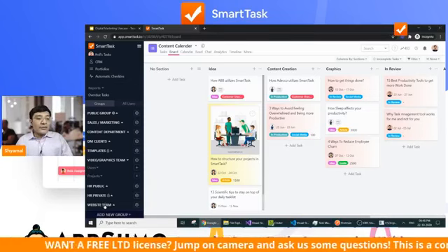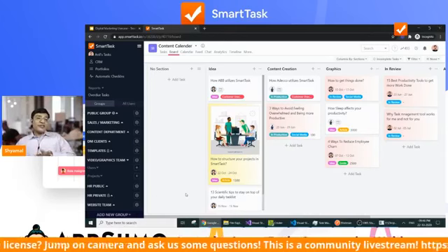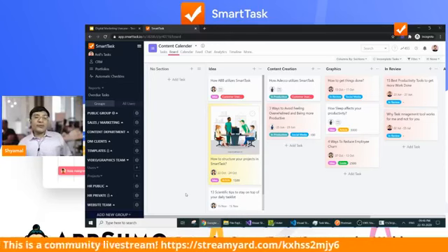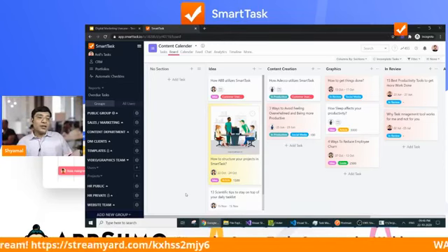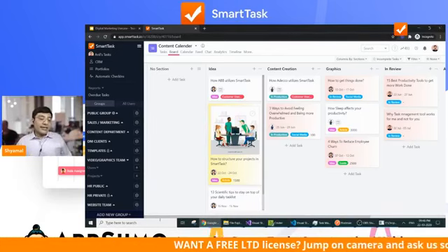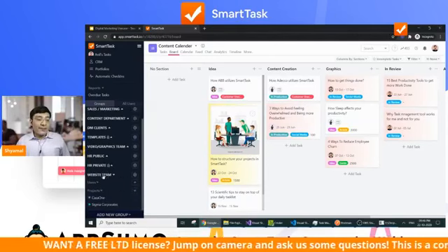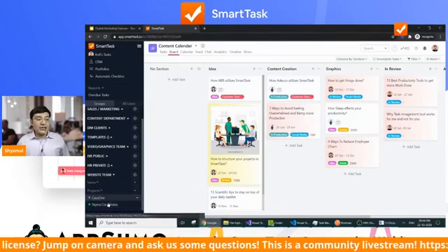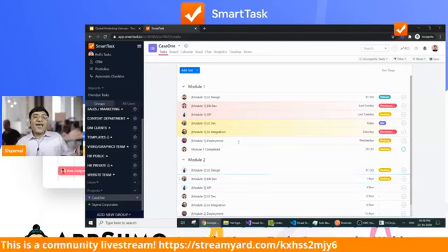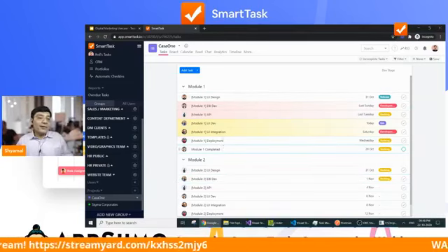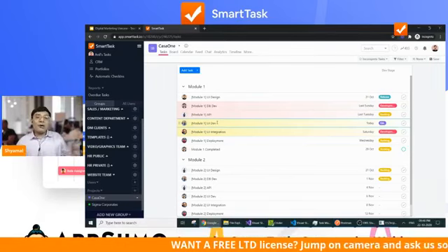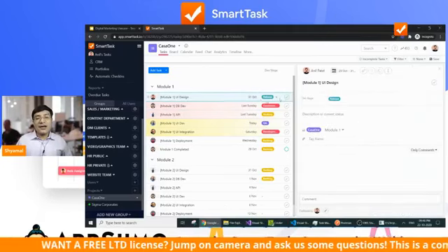Yeah. Now, so this is all about your content team, your graphics team, and your account managers, how they collaborate together. Now, one of the tertiary work that digital marketing guys do is create websites for their client, because client doesn't have the expertise and they do, for example. So in that case, you have a website team who are working on different kind of websites. So we have here Casa1. Typically, a website is always developed module wise. You have different modules, and then you have tasks under those modules, the tasks to be completed to get that module done. Module may be your page 1, page 2, say your welcome page, say your product page, that may be your modules. And then each task has different stages.